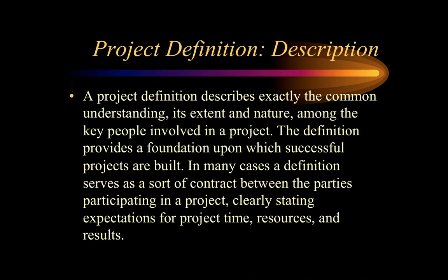The project definition, let me just go through this because this is crucial. The project definition describes exactly the common understanding, its extent and nature among key people involved in a project. You don't want people working at odds with each other. They must be on the same page. They must define the project in the same way. The definition provides a foundation upon which successful projects are built. In many cases, the definition serves as a sort of contract between the parties participating in a project, clearly stating expectations for project time, resources, and results. So you see why definition is so crucial.